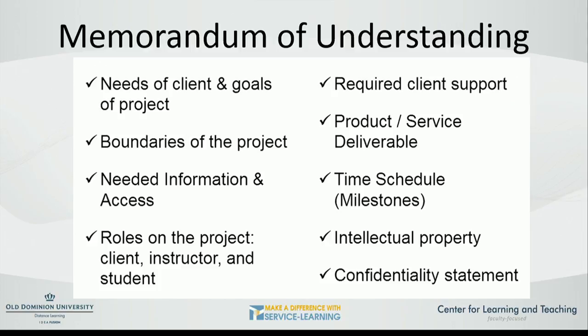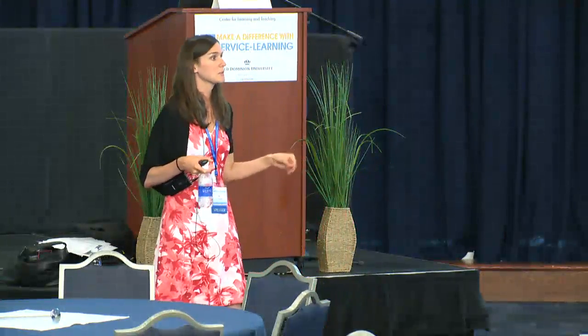So what's really good about the memorandum of understanding, or at least having those project objectives up front, is that you can let them know, we're going to need you to meet. And so, for instance, when we did the needs assessment class, Emily was our client, and I knew that I had a 12-week semester. I knew I wanted Emily to be able to meet with my class, I think, three different times throughout the semester. We set up those dates ahead of time.